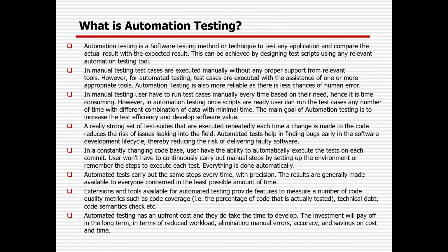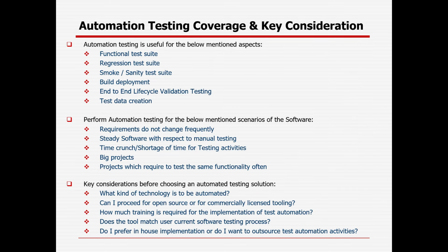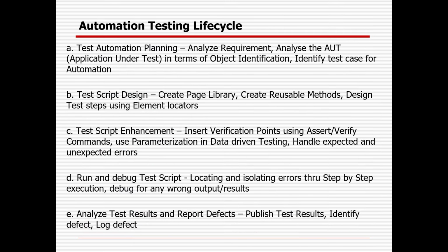With manual testing, you cannot cover all the permutation combinations, it is sometimes time consuming, and there are chances of human error. Sometimes you are not able to meet the project deadline, which is why you have a higher risk in delivery. So you can go with automation testing. Initially your investment might be more, but once your script is ready you can get real-time benefit. So you need to do a POC, proof of concept, and a return on investment calculation. After that, you can proceed.